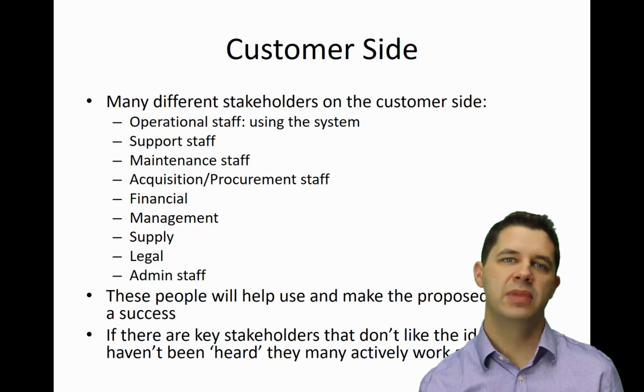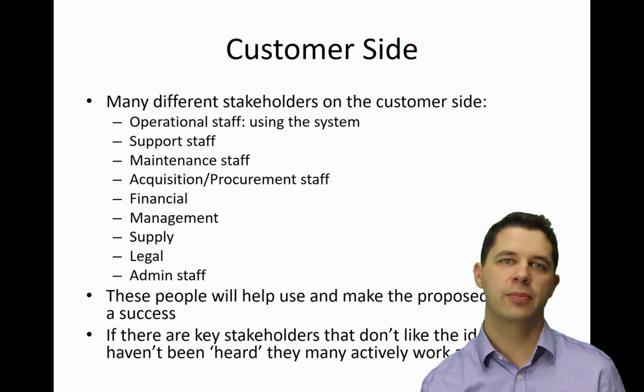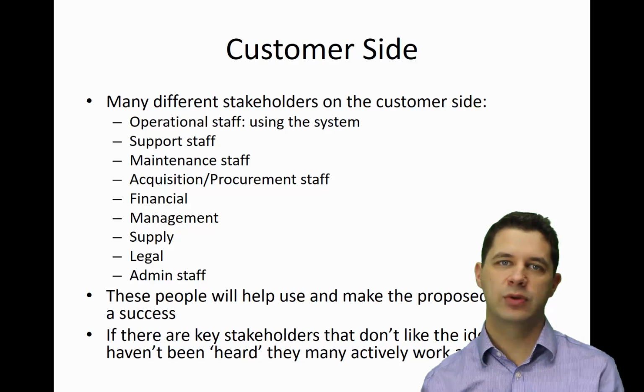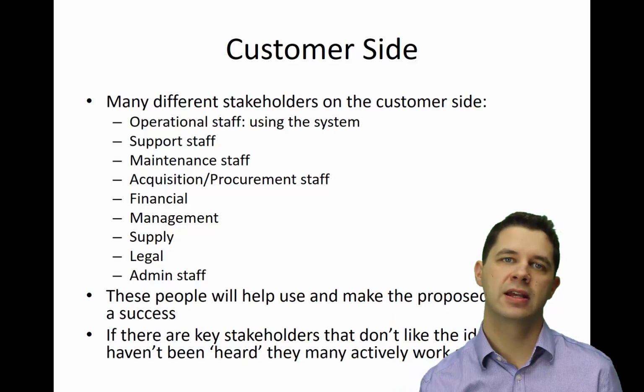We recently had this in our milling machines and acquisition of our waterjet cutter. A waterjet cutter, for example, is 8 tons, and we need to make sure the floor can support such a weight. Financial is an important one in terms of not just the acquisition price, but the ongoing costs and the cost of retirement at the end.